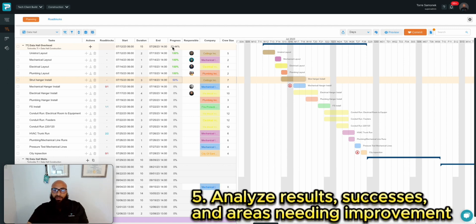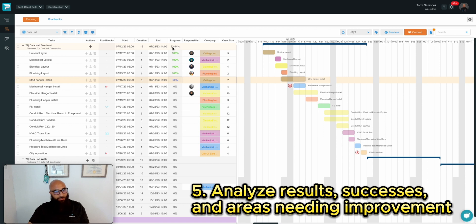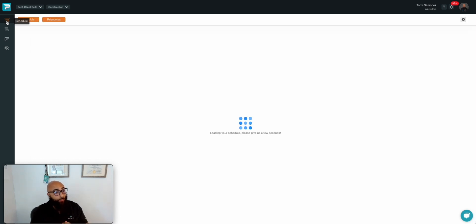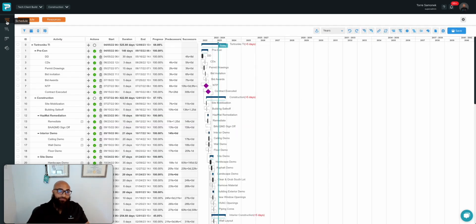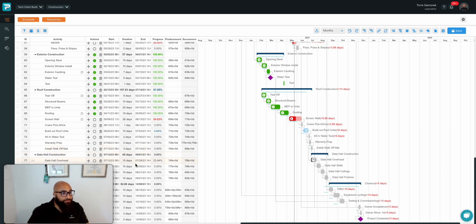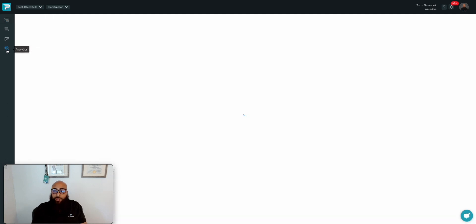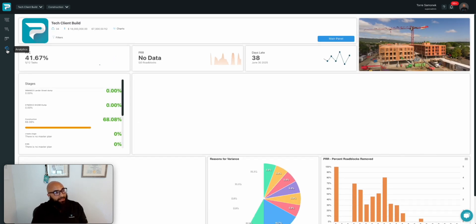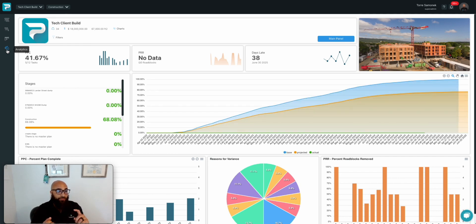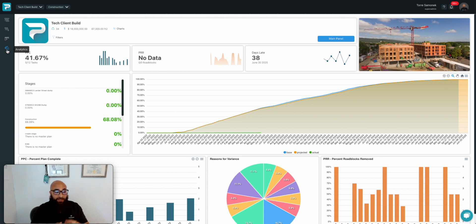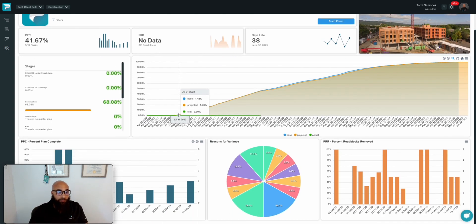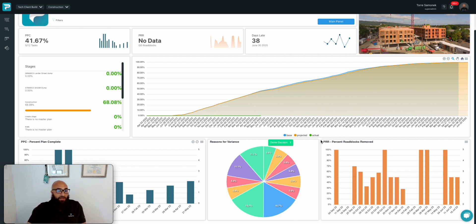Let's move into step five. Step five is analyzing the results, successes, and areas needing improvement. A couple of ways you could do that in ProPlanner. One is at the master schedule level, being able to track where you are progress-wise versus your baseline. For line item 77, seeing that we're 23% done and ahead of schedule. The second way you could track and analyze your results, successes, and areas needing improvement is jumping to the analytics tab. This is where you can get some great data and use this to learn from your experiences, gain from the wisdom, and also share winning results with other members of your team so they may replicate that on their upcoming projects.